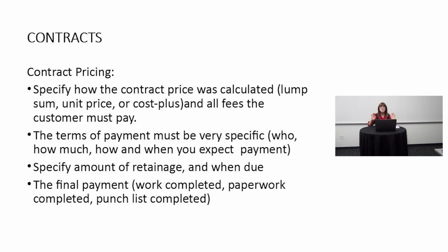You get your first big commercial contract, you turn in your progress payment, you get your check and you see that it's minus 3% or 5% or 7%. What is that? That's called retainage. The large contractor is holding back a certain amount of your payment, and he is going to pay it to you when you can specify that. That should be specified in the contract, and those retainage holds are negotiable. So be sure to ask.